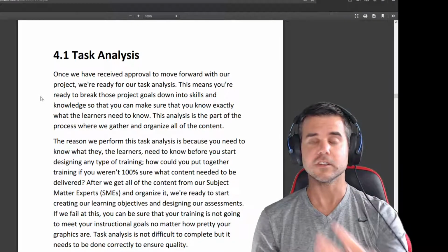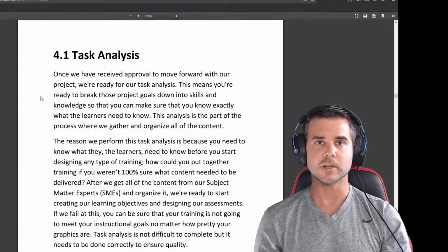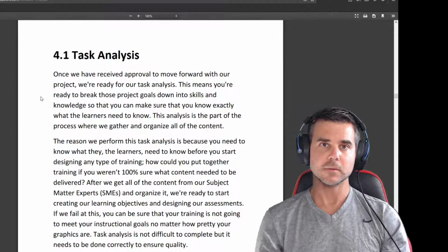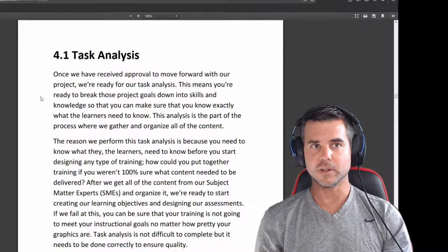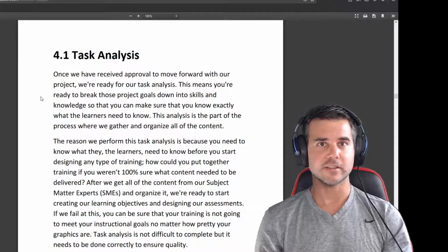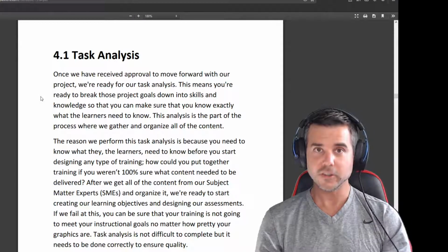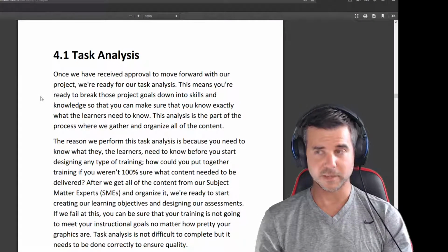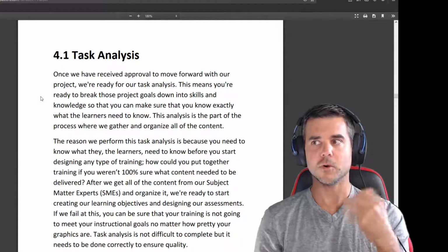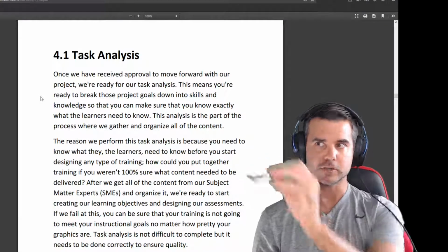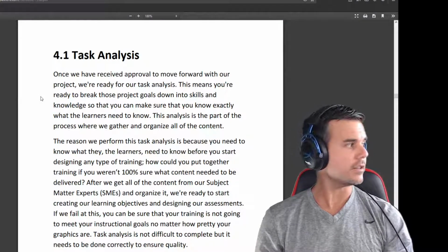So always make sure to explain that to the client too, so that they realize where you're getting your time estimate from, and show them some examples of that. It's one of the biggest lessons I learned early on: a client is really bad at estimating how long it's going to take. They are really good at underestimating, terrible at overestimating. So that's your job. And I'll talk a little bit more about coming up with that number, that budget, when I get to the end here about some of the stuff that I do.